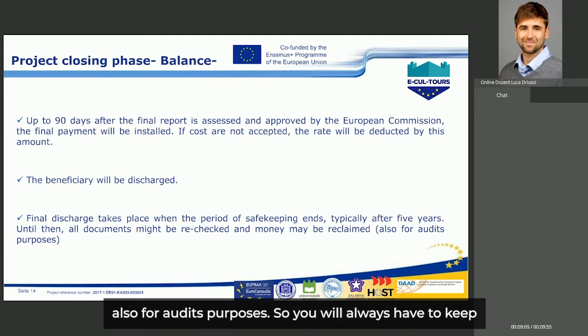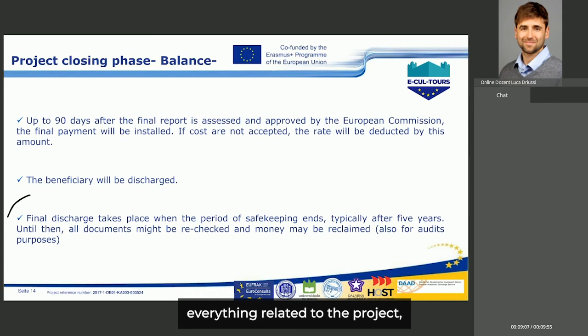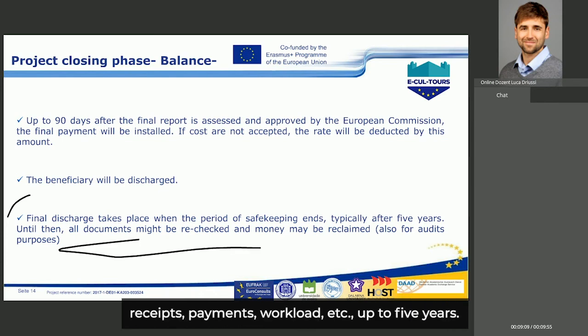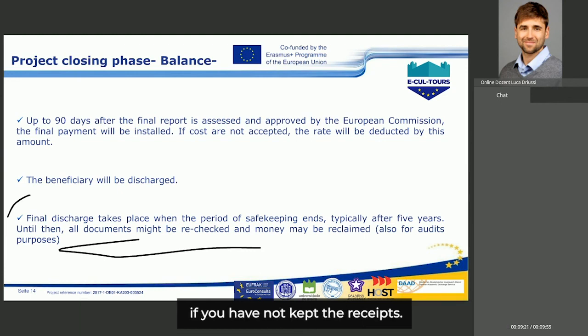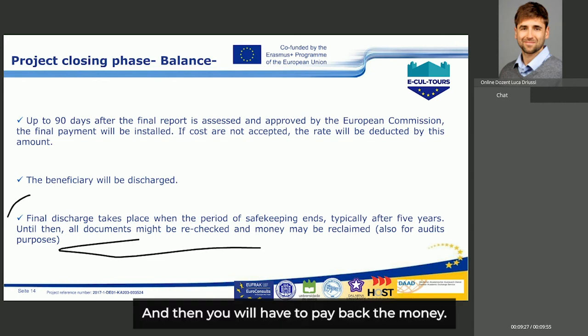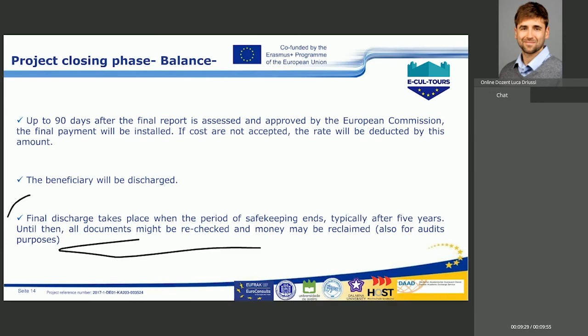So you will always have to keep everything related to the project, receipts, payments, workload, etc. up to 5 years. Otherwise, you can receive an audit and be held responsible if you have not kept the receipts. And then you will have to pay back the money.